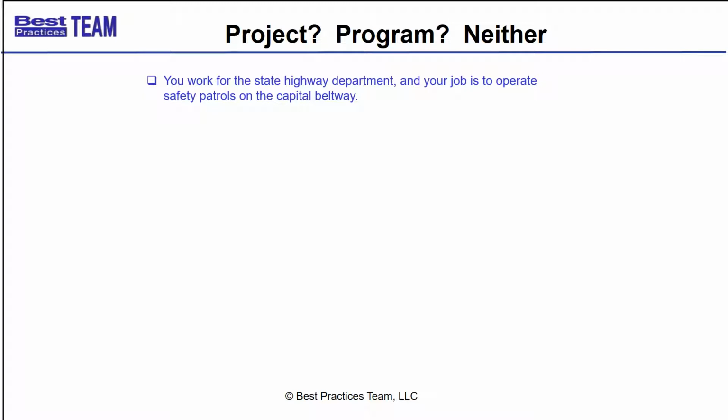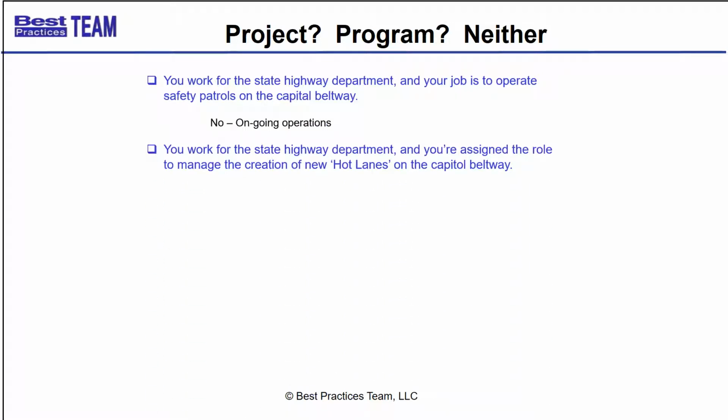You're an operations manager because this fails the definition of what a project is all about. We are not creating anything new here, and we're not updating an existing process or anything like that. And this is not time bound. This is indefinite. So it fails all the definitions of what a project is, and therefore it can't be part of a program either. So no, this is ongoing operations.